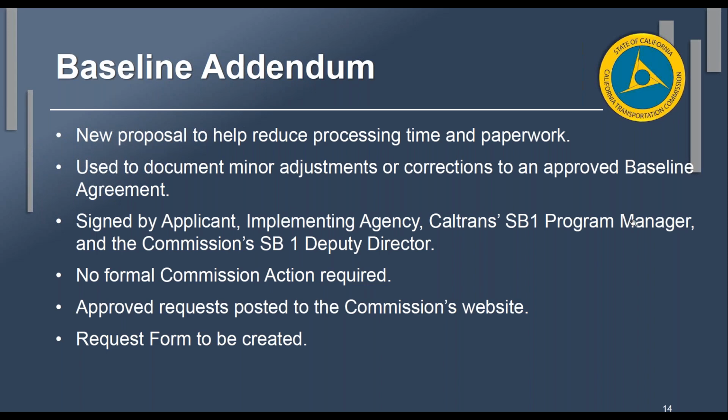These types of actions would not be a formal commission action, so it would not go to our regular commission business meetings, whereas the baseline amendment does still have to go to the commission meetings. And we would also post these requests to the commission's website, and we would create some kind of form that would be standardized for everyone to use.